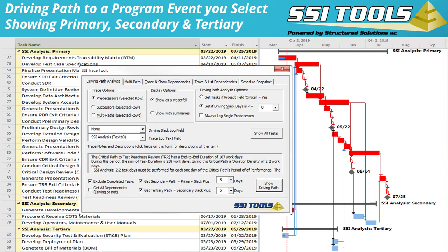Primary tasks have no schedule flexibility — they can't be delayed at all without impacting the Test Readiness Review event. Secondary tasks are considered near-driving path tasks; they can be delayed somewhere within the range of one to five days before impacting Test Readiness Review. Tertiary tasks are also near-term tasks, but they have even more schedule flexibility. In this example, those tasks can be delayed anywhere between six and ten days before impacting the Test Readiness Review.